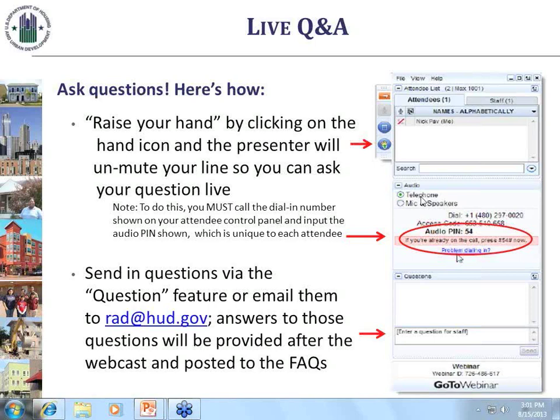Remember I said earlier on, under RAD, you don't get to do RAD and get tenant protection vouchers. So you've got to manage the relocation on your own. You're not getting any additional resources. You can use the subsidy that we're giving you to this project during construction, because the subsidy will still flow.